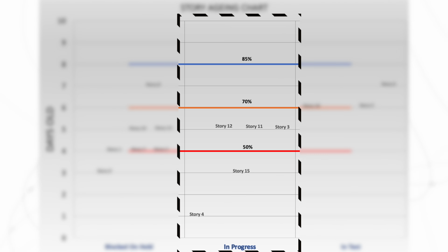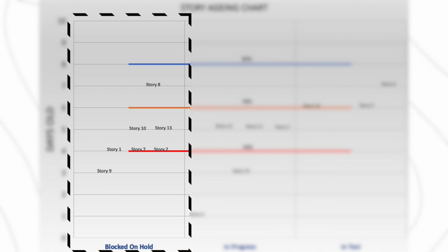Now, understanding this at the time it's happening, or before, perhaps at the 50th percentile, gives us great insight into actions we need to take on specific stories. Where is it in our workflow? If it's still in progress and not even reached testing yet, do we need to swarm on it? Is there a blocker that needs removing? Should we split the story? What can we do as a team to ensure we don't violate our forecast?